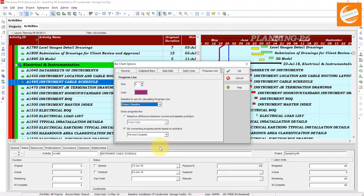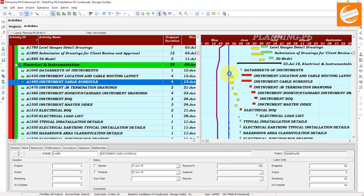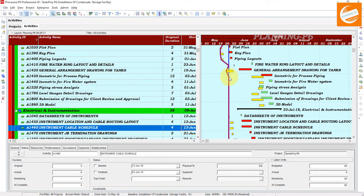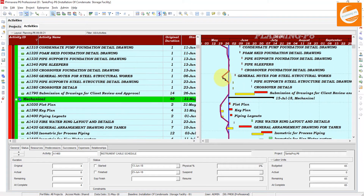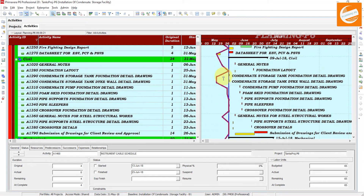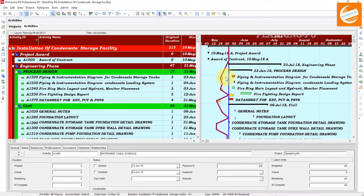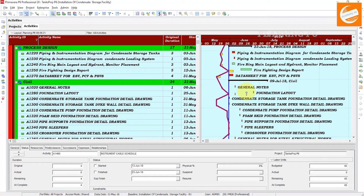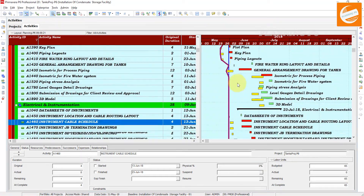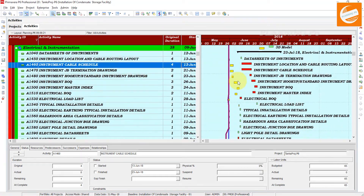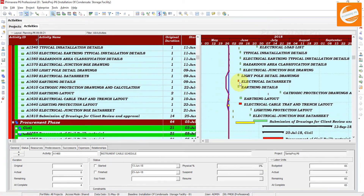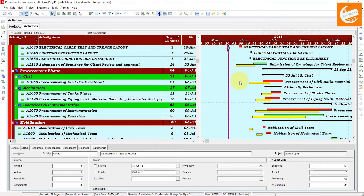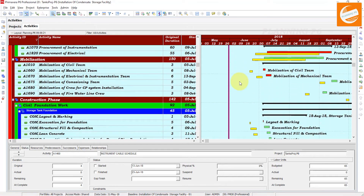If you select percent complete and click OK, now you can see the progress line is showing according to the percent complete. It is at zero percent, so we are behind the schedule, as you can see.